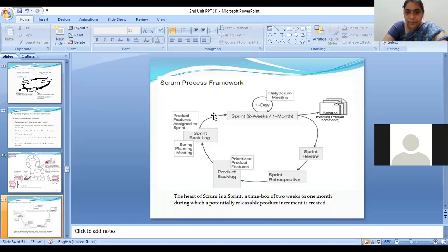After the sprint backlog is prepared, the sprint is developed within 2 to 4 weeks of time. So we don't take much time to release our product. It should be released fast. Every increment should be released within 2 to 4 weeks of time. Within this time, daily meetings should be conducted among all the team members to share their information, which will have a very short duration.